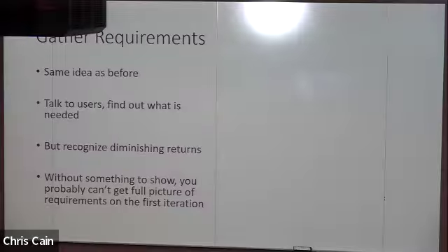Requirements work the same way as before. Talk to people, the end users, figure out what they want or need, but recognize that the more time you spend talking to them, the less relevant information you're going to gather. So eventually that communication needs to stop, because the time that you're spending continuing to gather those requirements is better spent creating a prototype, creating a first usable system, a first deployment, and getting feedback on that.